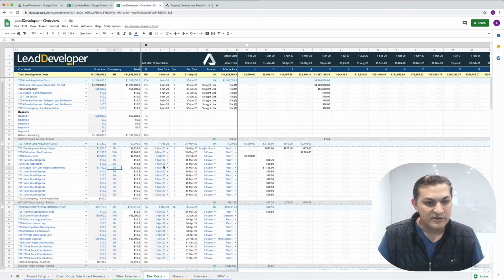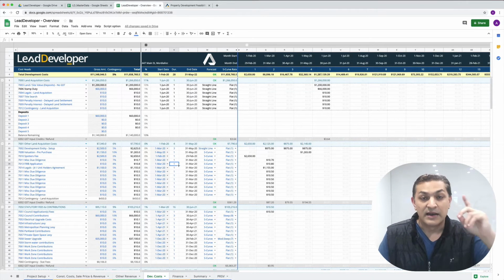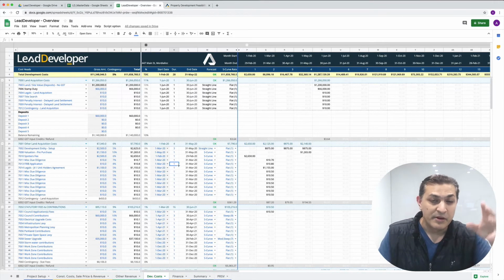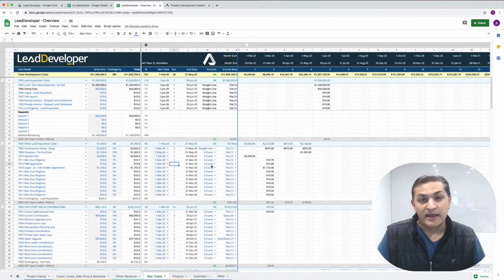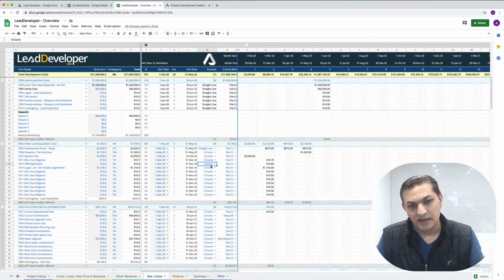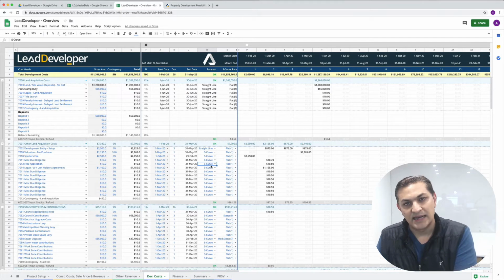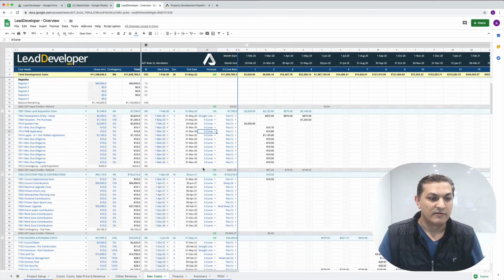So if you say, okay, it's going to start in March and it'll be a single payment, 2 payments, 3 payments, or it'll span over 5 different payments, you can select that, and then whatever that cost is, you can have it forecasted in a straight line method or an S-curve along a bell curve with the steepness of that curve.